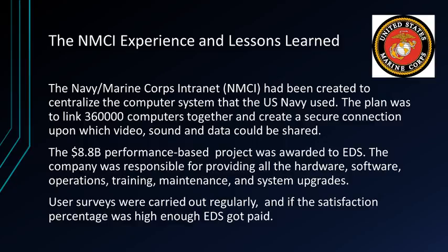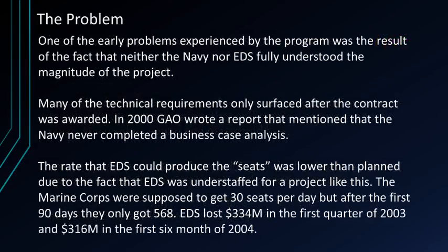It showed that EDS did their best to make the job as good as possible. Now, the problem. One of the early problems experienced by the program was a result of the fact that neither the Navy nor EDS fully understood the magnitude of the project. Many of the technical requirements only surfaced after the contract was awarded.